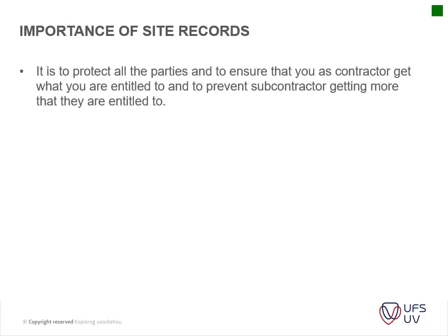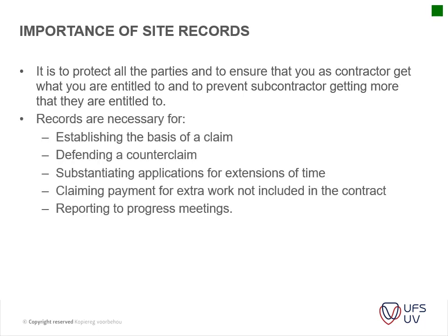Importance of site records. It is to protect the parties and to ensure that you as contractor get what you are entitled to, and to prevent subcontractors getting more than they are entitled to. The records are necessary for establishing the basis of a claim, defending a counterclaim, substantiating applications for extension of time, claiming payment for extra work not included in a contract, and reporting to progress meetings.